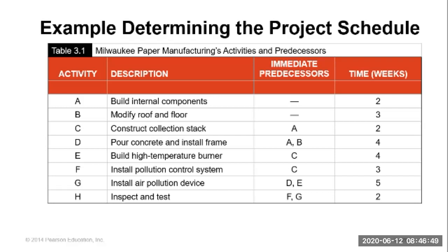E can start when C is complete, and F also starts when C is complete. So when C is complete, you can start E and F at the same time. Then start G after D and E are complete.